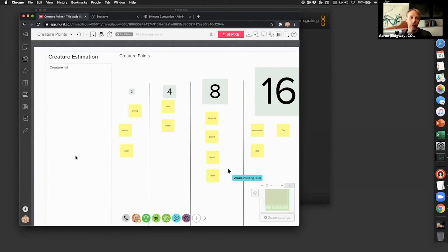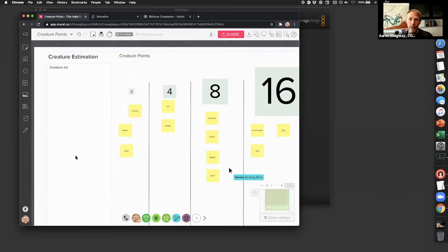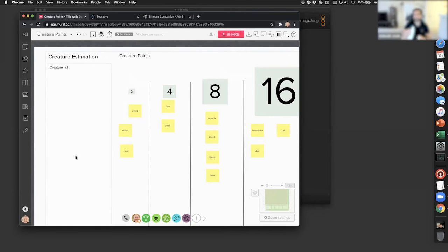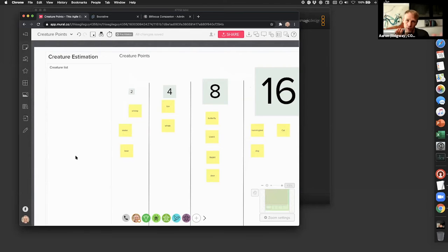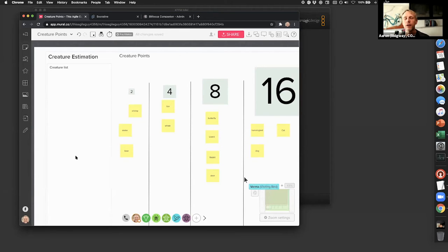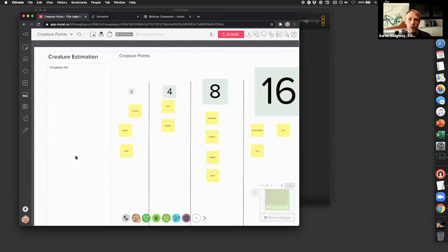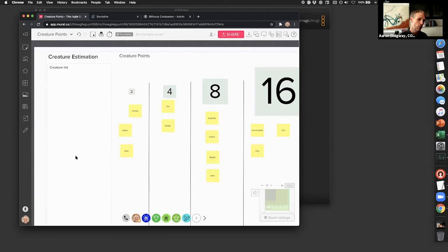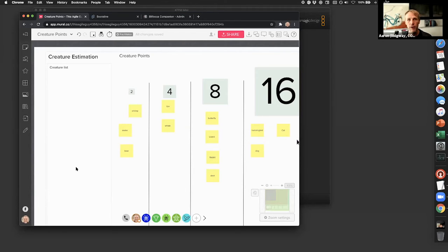Yep. This is self-organization. We have a purpose, a goal. We have some simple rules. It's pretty tightly constrained, right? What are simple rules? You call on the next person. I use that technique a lot for daily stand-up. If we're remote, instead of one person's scrum master saying, okay, Amber, you're next. Whoever's going calls the next person. Keeps everybody on their toes just a little bit. You never know when you're going to be called on.